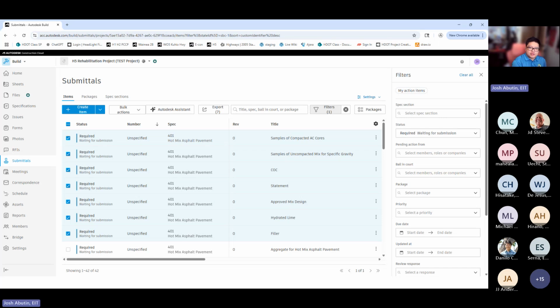And during the initial review of the template, that's an opportune time for you to communicate with the contractor and establish some target dates for submittals and when they need to be submitted. This tool can help you as a CM to create reminders for yourself and the contractor for upcoming critical submittals, planning ahead and giving the project team ample time to review the submittals and help you stay within the schedule and mitigate those delays.